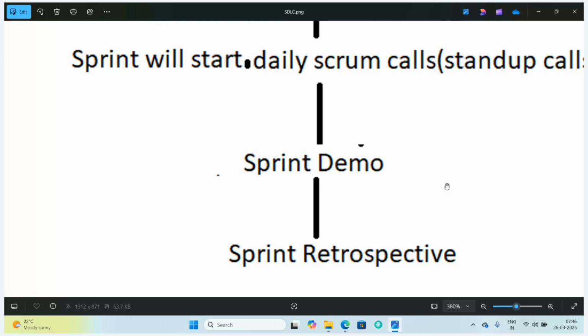Okay, so in the retrospective meeting, we discuss what went well and what did not go well. Whatever points we get under what did not go well, we will have to improve in the next sprints or next releases. Then we will have this information tracked, stating that in this particular sprint these are the points that were raised. Now we are going to improve these points.